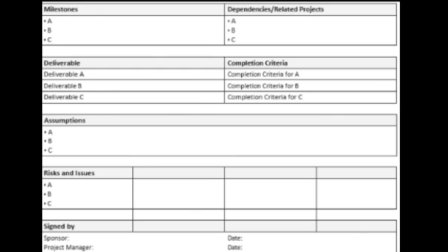So when you have done this, both you and the project sponsor will go through the project charter, and if it is satisfactory, the sponsor will sign and put the date. You, the project manager, also will sign and put the date. Then this brings an end to the initiation phase of the project.